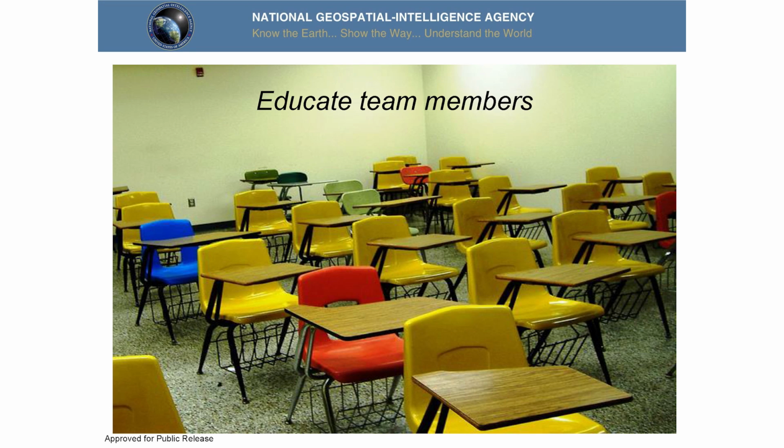3 lessons learned in working with teams. Educate team members. When we started this effort, it was just me and my head and my desktop, and I was just fine until I got help. And when other people came on the team part-time, what I found is everyone wants to do things their own way. So right up front, I had to realize I had to document the concept of operations, a PowerPoint presentation walking people through what we're doing, and have common templates. So the whole team was doing it the same way. And Sharon's actually going to talk about education in terms of JSTORs and what they have also done in this area as well.